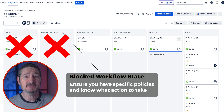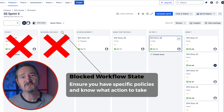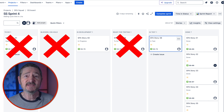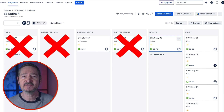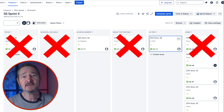A quick word on the blocked workflow state: you need specific policies on this. Don't move items to this state for any old reason, and you need to know what action you'll take when something enters this state, otherwise it will just become a dumping ground. We'll also exclude Ready for Testing because it's a wait state — waiting for someone to pick up and test. And we'll exclude Done because when a story enters Done, we're not working on it anymore. So the first thing you need to do is identify what wait states you need for your workflow. Wait states are very useful, especially when you view your aging work in progress chart, as you'll be able to see where a story is in your workflow.